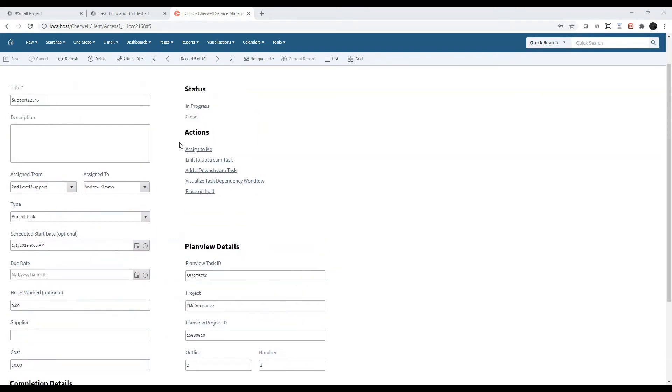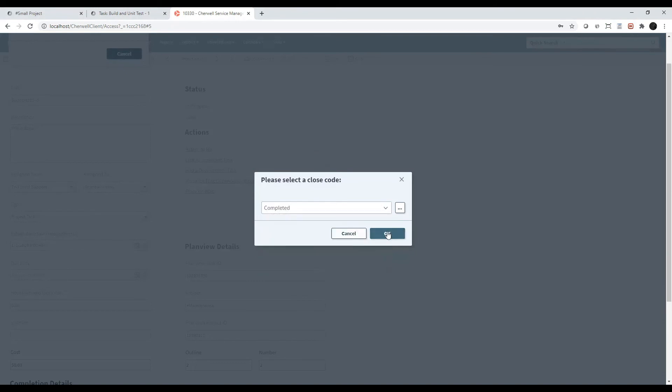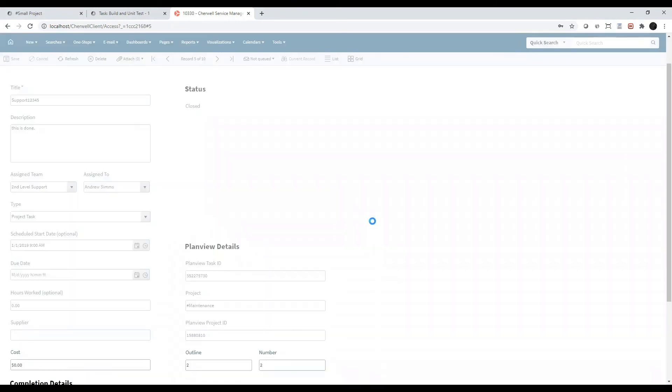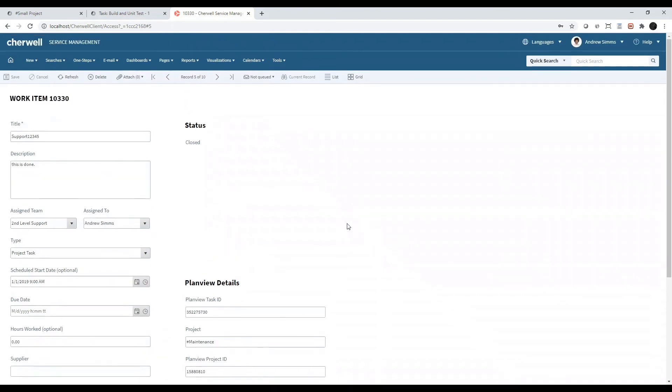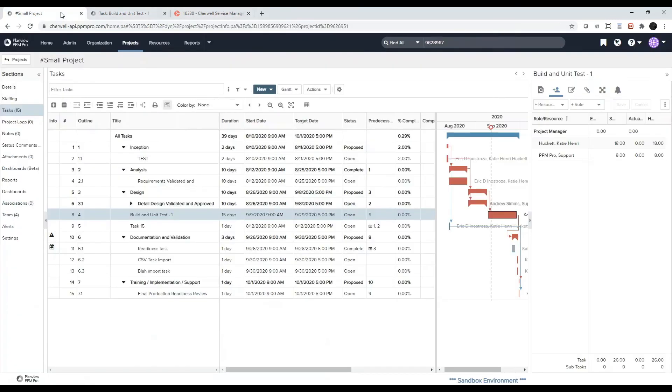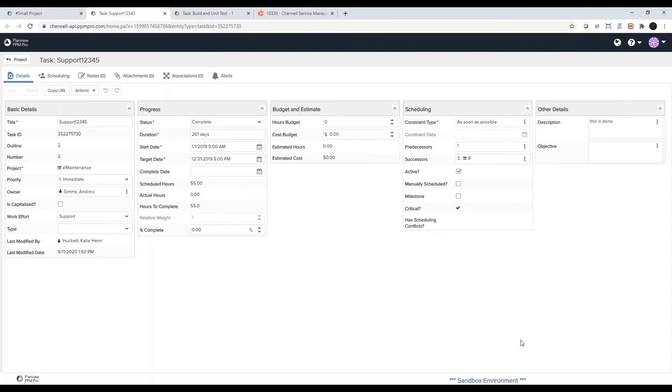If I make a change to this task here in Cherwell, and I'll also move the status. When the work item is saved, it automatically updates in PlanVue. So if I grab the PlanVue task ID, and I go back into PlanVue and search for that task ID, now you can see that my changes I made in Cherwell are reflected here. The description, this is done, and the status is set to complete.